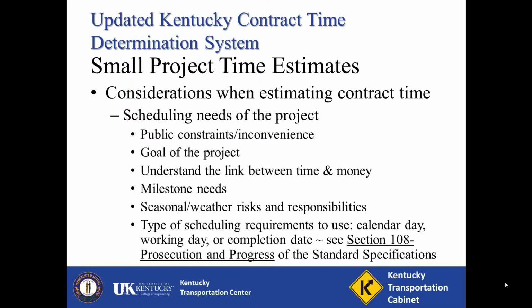Milestones are a schedule tool that can be used to have different aspects of the project completed by times varying from the total project completion date. These may be added to the contract time estimates produced from the tools provided here, but these tools are not sophisticated enough to automatically make adjustments from adding these milestones. This will need to be done manually.